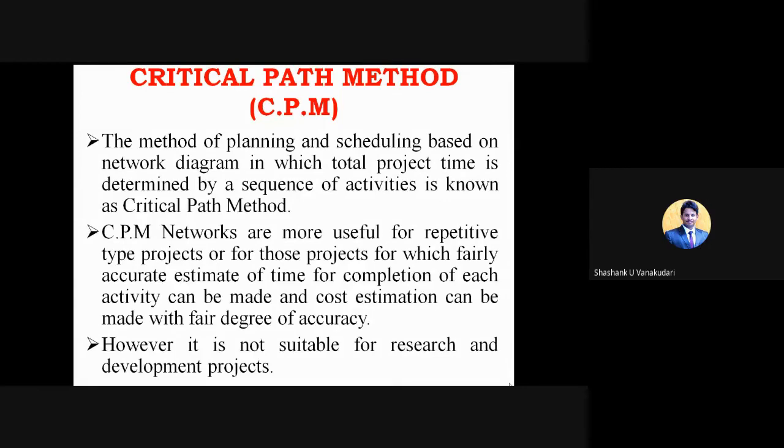It can be preferred for repetitive types of projects, because we will know the start date and end date of each activity, I mean the total time consumed by each activity, and even the sequence, which activities we need to start first and which next. When we know the thorough sequence of these activities, we can easily monitor, and CPM helps in such cases where we get repetitive works.